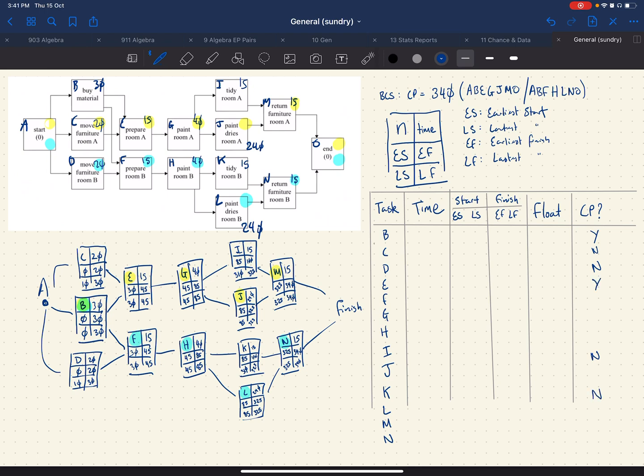Right, and this matters because if there's any hold up on a task on the critical path, it will push out the timing. Now, because there are two critical paths here, we have made it so that there's a bit of redundancy. Just because there's a bit of a hold up on one of them, we can problem solve. The efficiency gain is going to be twice as good if we can figure out how to solve these things ahead of time.